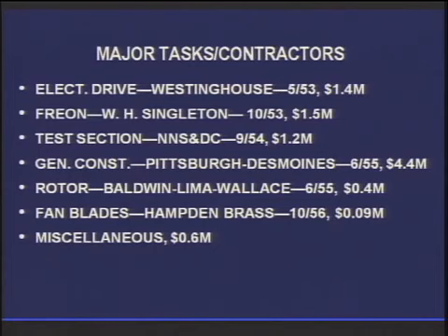Here again, Langley would furnish the dimensions of the test section, but the shipyard would in effect design it, where in the original plan Langley would have designed the test section and just had somebody build it for them. The argument put forth for going with the shipyard was, hey, it was close at hand. We can really keep tabs on these prices. You know, cost escalation was a big deal. They've done a lot of work with them before, so we have a good idea of what their costs really are. Headquarters bought this.